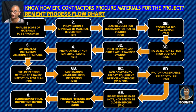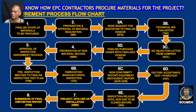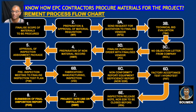After manufacturing and fabrication finish, during the process there might be non-conformity or Equipment Deficiency Reports — NCR or EDR — and the vendor must comply and rectify them. After clearing NCR/EDR, the factory acceptance test and hydro test will be done as the final acceptance by vendor inspection. The vendor inspection department then releases the material or equipment via an Inspection Release Note (IRN). After the IRN is issued, the vendor's responsibility is almost over, and they send the material or equipment to site for project installation.